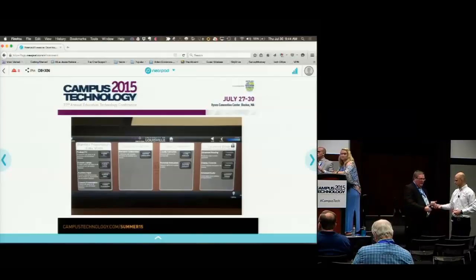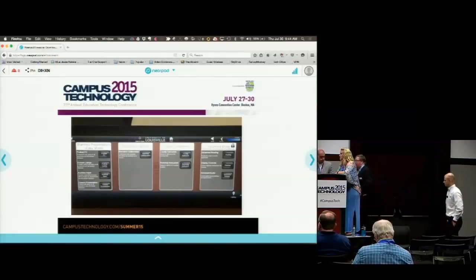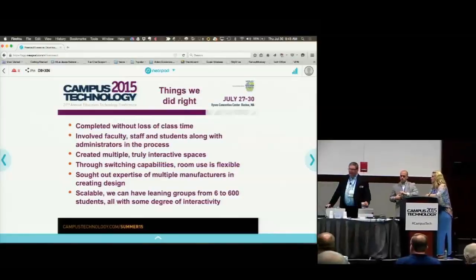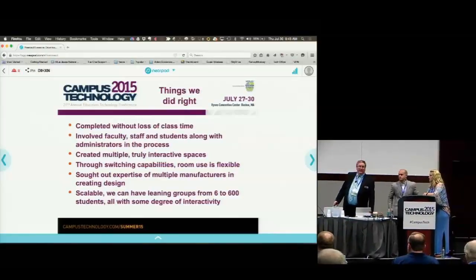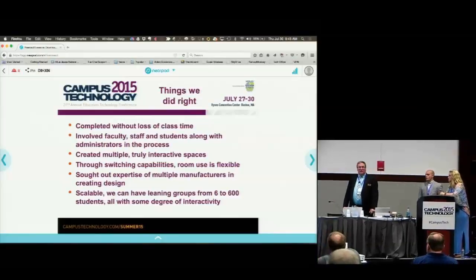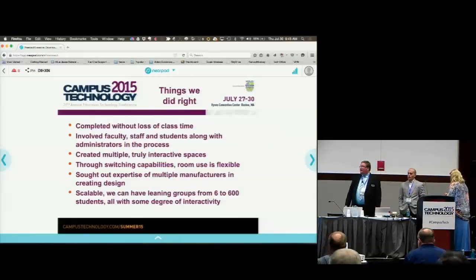So I'm going to come up here a second. We're going to change a few things. A couple of things we did right. We completed this without loss of class time. There were not students working in a class where hammer drills were going on down the hall or anything like that. We actually waited till class was over. We renovated our library during spring break so that our students would have a study space over the summer who were studying for step 2.